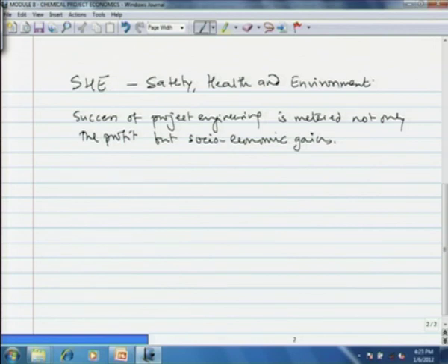Engineering of a chemical project is a coordinated combination of technical and non-technical activities. Now, the technical activities we have already seen. The non-technical issues include obtaining all the statutory clearances required from various authorities such as the Pollution Control Board and the State Electricity Board, the procurement of land and plot, and finally, the timely arrangement of the required finance to implement the project. These are important because the timely construction of a project is controlled by the availability of sufficient money as and when required.